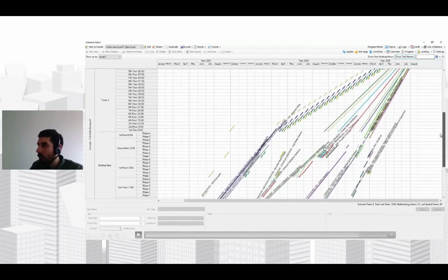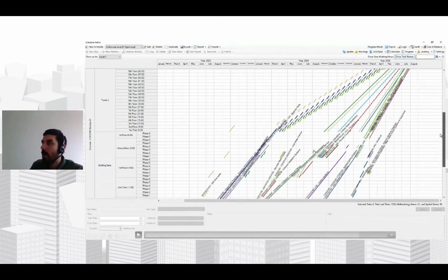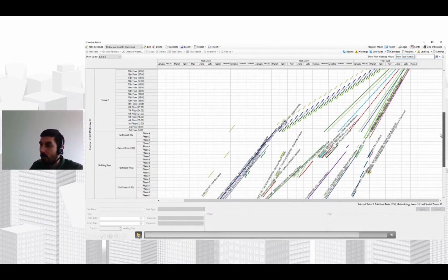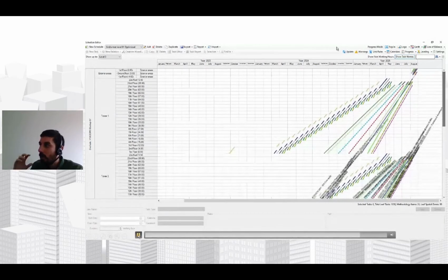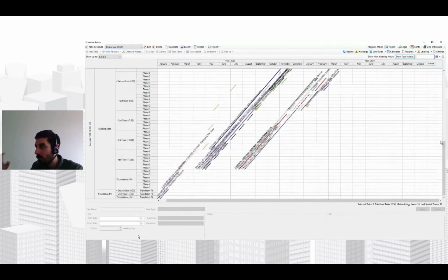Here is the same schedule with the optimized structure, with some durations changed according to the needs of the project. Some activities are delayed. They are set as late as possible activities, some finishing activities. So we were able to fine-tune it and to get a more optimal schedule structure.